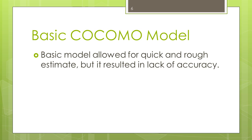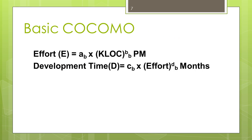Basic COCOMO allows for a quick and rough estimate but lacks accuracy. The basic COCOMO model gives an approximate estimate of the project parameters. The basic COCOMO estimation model is given by expressions for effort and development time, where KLOC is the estimated size of the software product expressed in thousands of lines of code. The constants AB, BB, CB, and DB are defined for each category of software project — whether the product is in organic mode, semi-detached mode, or embedded mode.